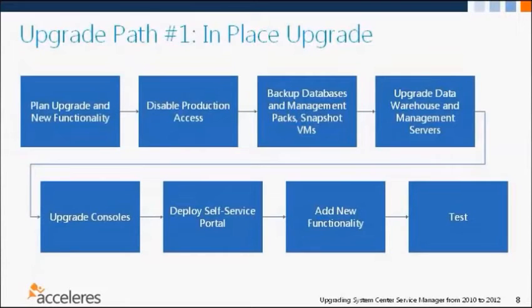Then you'll run the actual upgrades. There is an order, and there's an upgrade guide on TechNet that goes through the specific steps involved with doing the actual upgrade. But you'll upgrade your server components. Once that's been done, you can upgrade your console components. All of your consoles will need to be upgraded to the newer version. And then sort of optionally, you can deploy the self-service portal at that point. If you're going to use the portal, that would come last in this step here in terms of your installs.